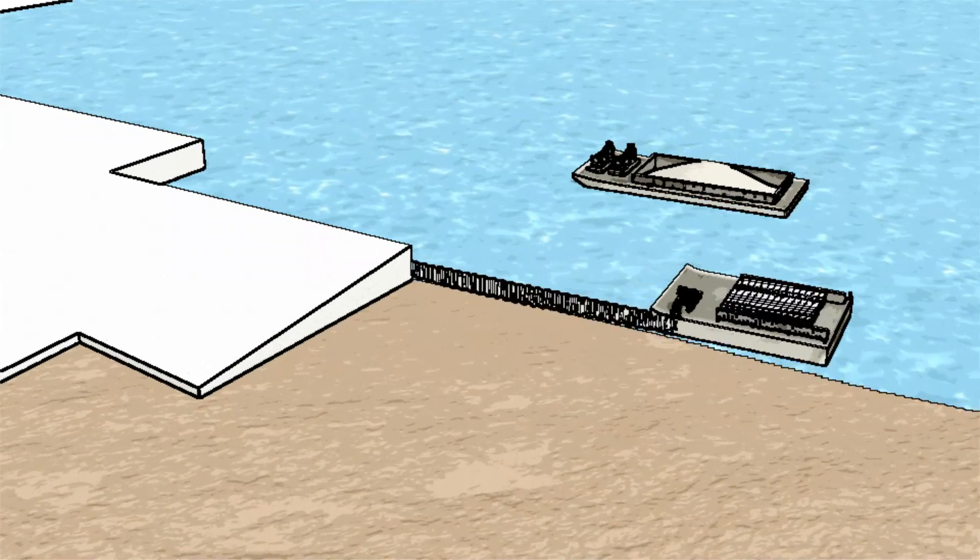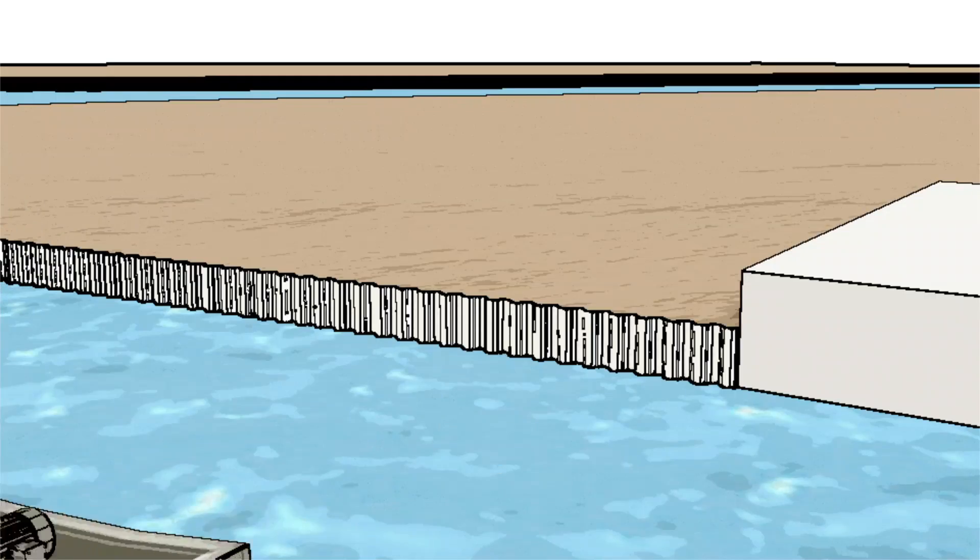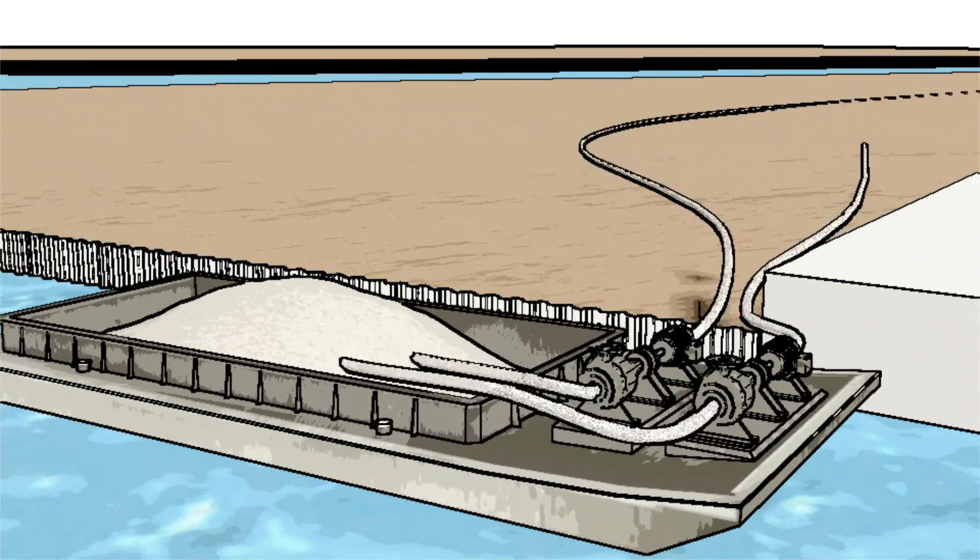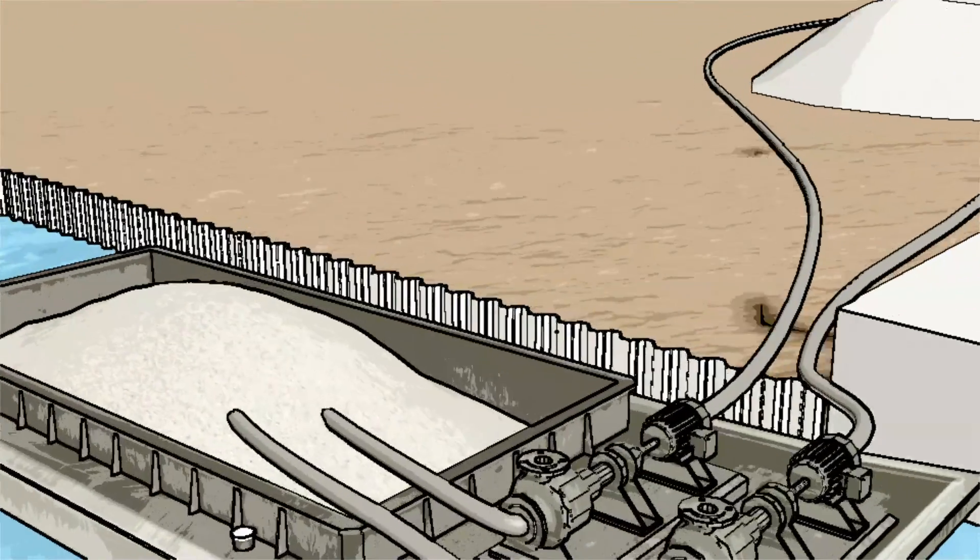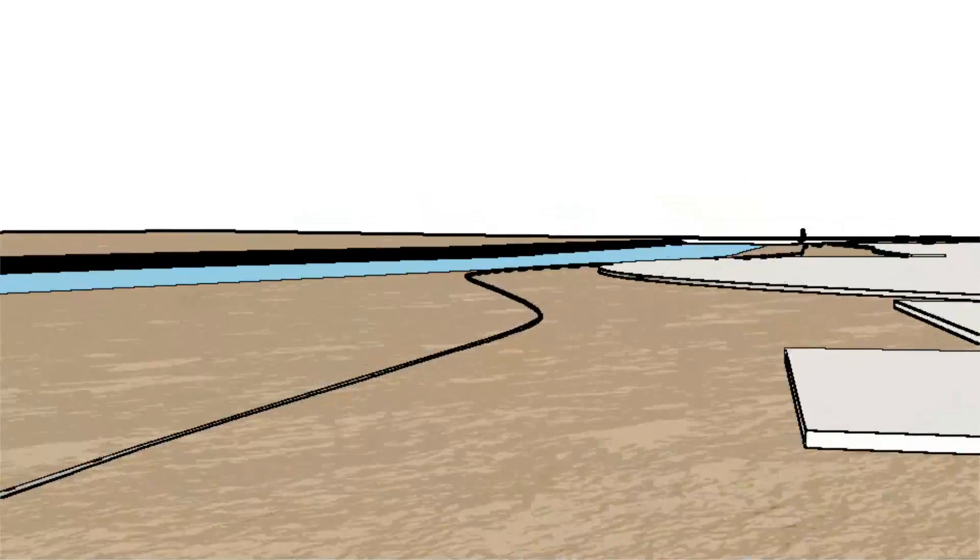A pumping barge will be stationed permanently at the Southern End, pumping backfill materials delivered by another barge to the Northern and Southern stockpile areas.